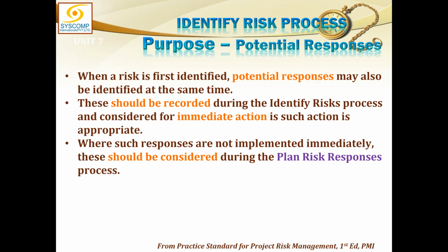Now this is very interesting. When we are doing the deliberate risk identification process, naturally we are collecting these risks from some stakeholders. Some people are telling us that this can be possible. So whomsoever is telling you that, or giving you this risk, please try to collect some more data from them, which should include what they think the potential response to that risk should be. This is not going to be your final risk response, but this is a very good point to collect the potential risk response right from the outset.